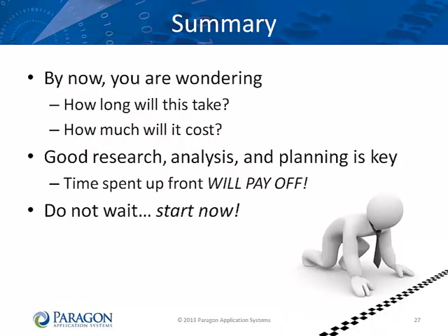Clearly, migrating to EMV is an expensive and lengthy project for an acquirer. You will want to start taking inventory and doing your analysis right away. Consider the possibility that you may have to wait for parts, terminals, or service once many other acquirers get into their EMV migration projects. Remember the key dates we showed earlier. And you really do not want to be one of the last to migrate to EMV. Those who wait will very likely become special targets for criminals as they focus their efforts on those who have not migrated to EMV. So, start now and good luck.